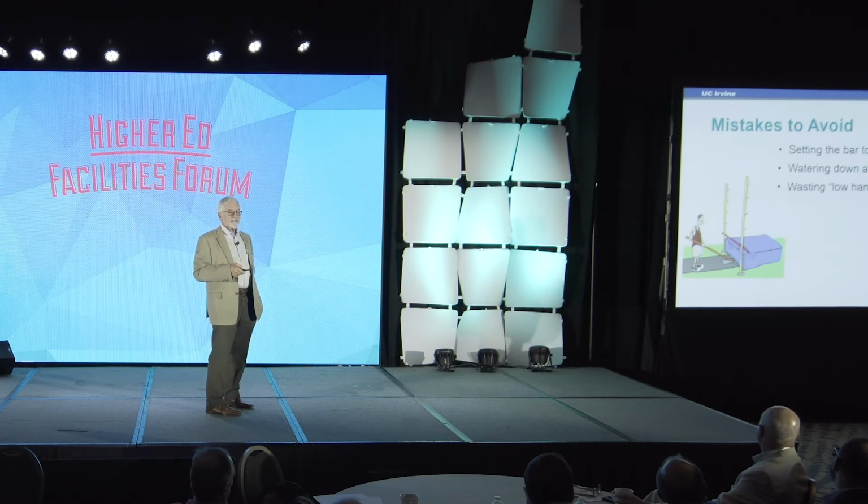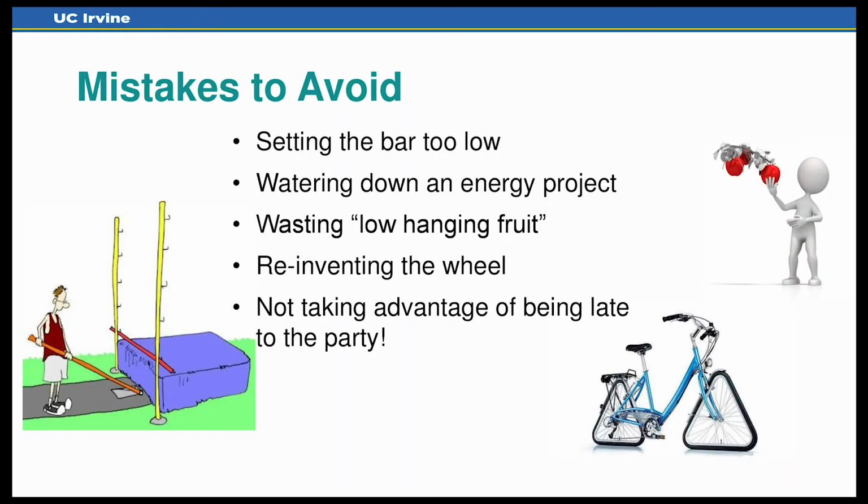Don't waste low-hanging fruit, especially if you have an opportunity to combine things that have a fast payback with things that have a longer payback. Our lab project was a good example. In the smart labs, the lighting paid off in a few years. The air acuity and smart controls and what I call the information layer probably has an 8 or 9 year payback. Combine it, you actually have a project which, well, you saw the numbers, they look good. So don't waste that opportunity.